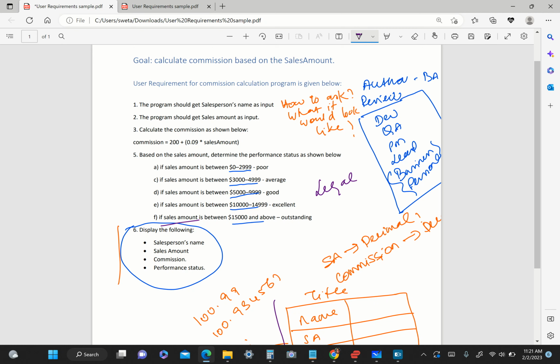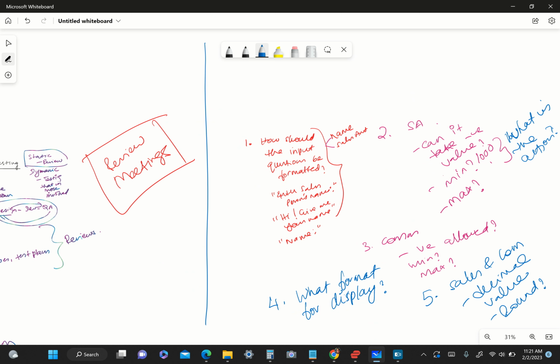They convert anything the business tells them into proper story cards or requirement documents that will be used going forward by the development team. Just remember, if something is not in the requirement document, after the requirement is approved, it has to go through a change process. Whatever is in your requirement document is set in stone. If you want to change it, there is an estimation process. So let me talk about it a little bit.